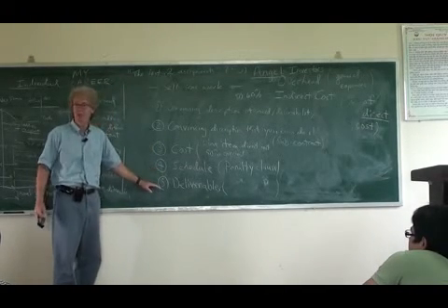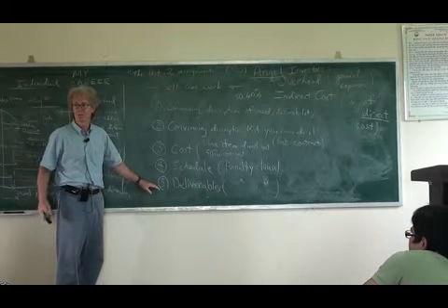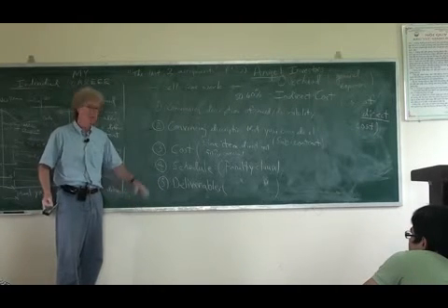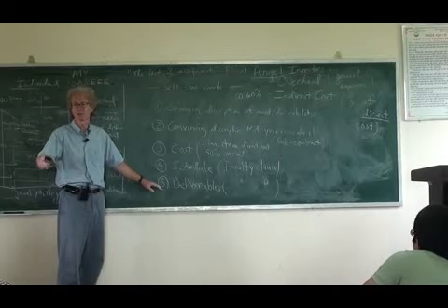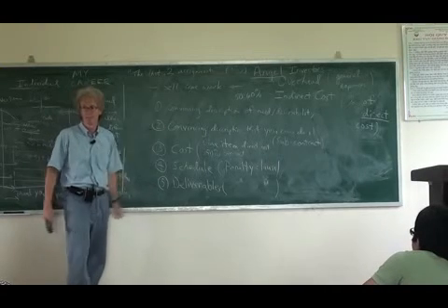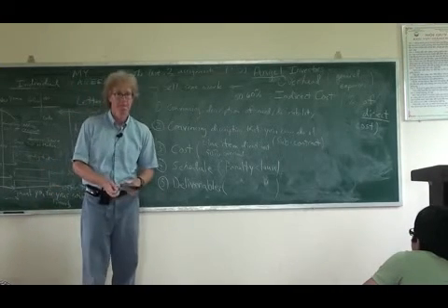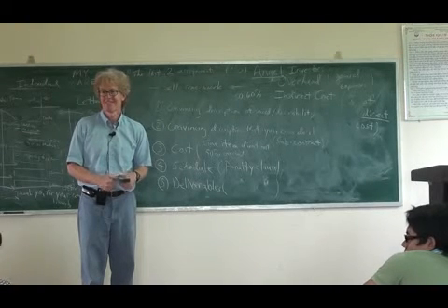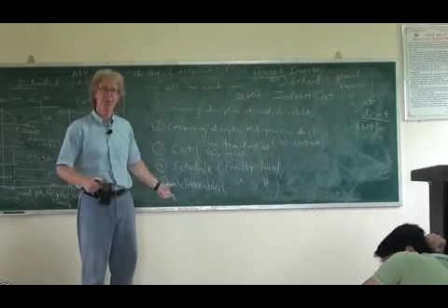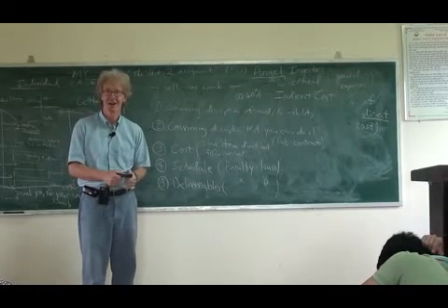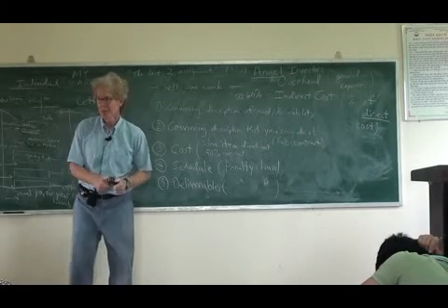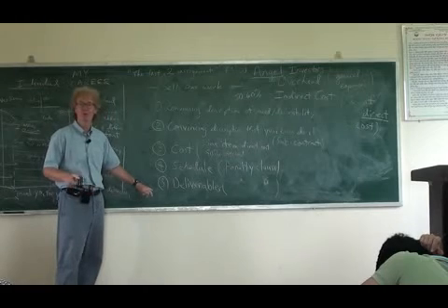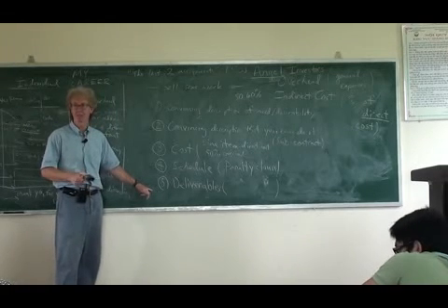And then a description, here's what we're going to give you. When it's all done, we agree at the end that we will provide these things to you in exchange for the funding, for the funds. Then we can negotiate. This is just a proposal. It's not the contract. But the thing that you propose, you want to make it as close to what you want to see in the contract as you possibly can.